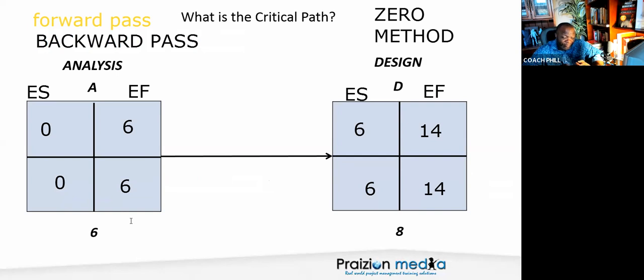And for my student I'm working with right now, her schedule is exactly that: early start, early finish is the same as the bottom, which is the late start and the late finish. It's chock-a-block. But that is not surprising because a lot of projects in the real world have zero slack. What do I mean by zero slack?